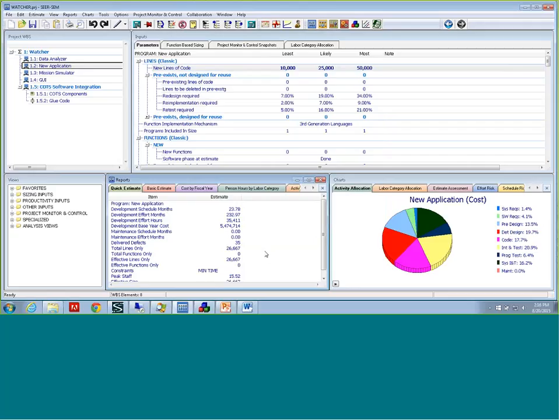So all we did was make those knowledge-based selections and put in some size, and now I can see that this estimate is going to be around 35,000 hours, and it's going to take almost 2 years, a little less than 24 months. And that's without even fine-tuning those individual parameters. But that is the industry standard based on the knowledge-based selection.